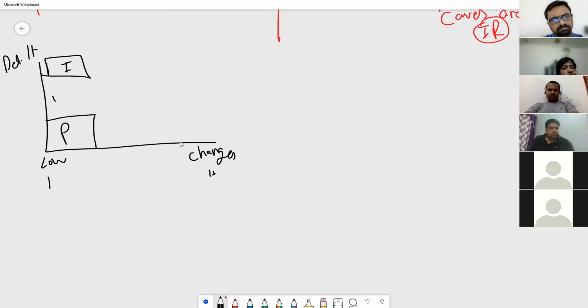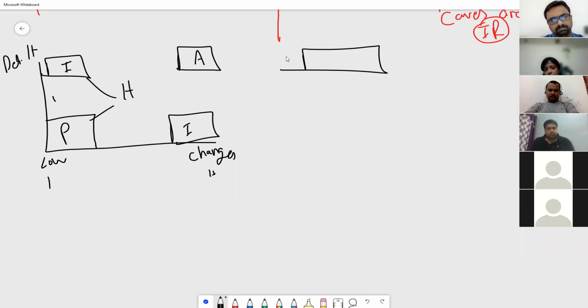If delivery will be at one pace, but there can be multiple changes, like when we are making a prototype, then we use the iterative life cycle. If there can be multiple changes and the delivery will be in parts, we use agile. And hybrid can be a combination of any of these. Agile and hybrid work hand in hand. Agile and predictive, predictive and agile, it can be combined in any way.